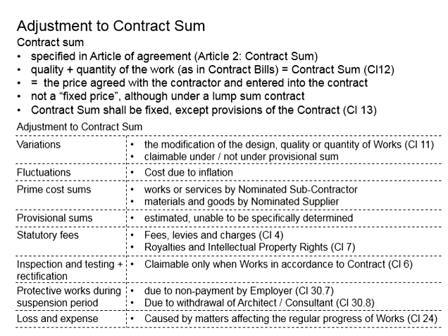With that, based on the experience of the contractor, a price is estimated, and we expect that the final quantity or the final figures are to be confirmed after the relevant work has been completed. The contractor should be able to claim whichever amount of work that he has executed. For the work not being executed, the contractor shall not be entitled to any payment.